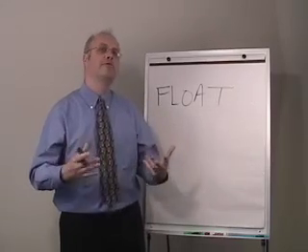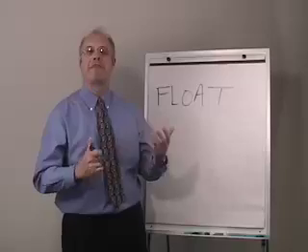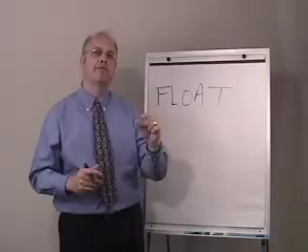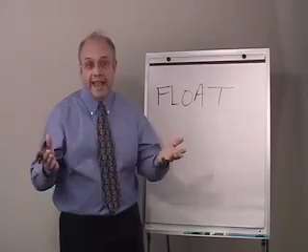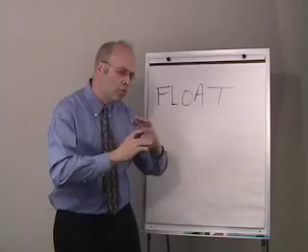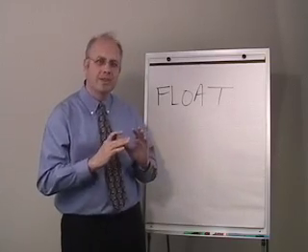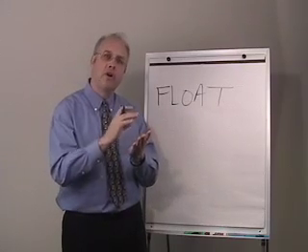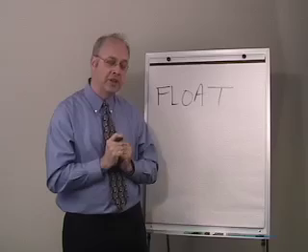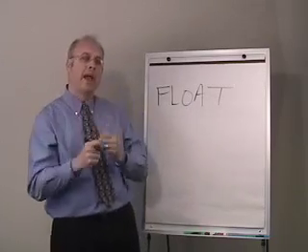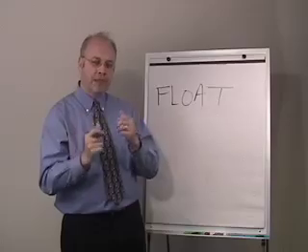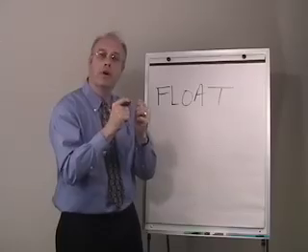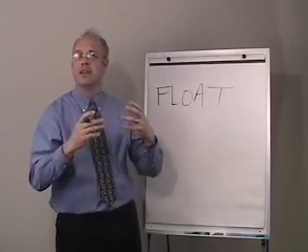You can also define float, what I would call, sort of mathematically. If you're working with a CPM schedule, mathematically, float is the difference between the early and late dates. In other words, when I run a schedule calculation on a critical path method or CPM schedule, I typically will calculate early start and finish dates for a particular activity, and from the backward pass, I will calculate the late start and finish dates. Now, mathematically, the difference between those early start and late start dates or early finish and late finish dates is float.